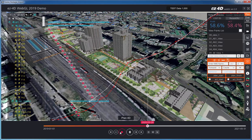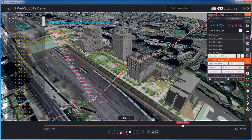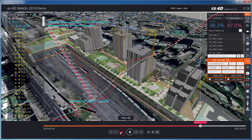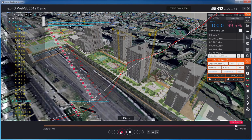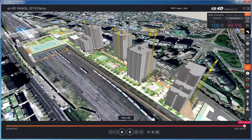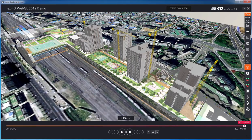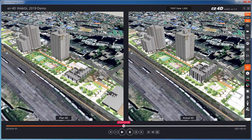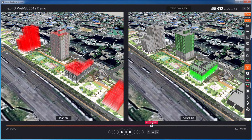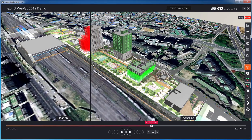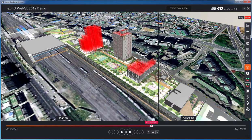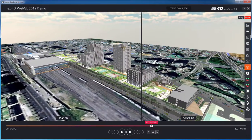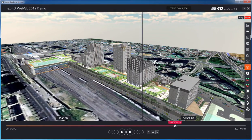Users can check progressing activity in 3D by overlapping the progress status with activity bar S-curve in 3D. Also, 4D progress of plan to actual in both screens can be executed and managed at the same time. If actual progress is later than planned, it is displayed in red. If actual progress is faster than planned, it is displayed in green. This makes progress control clear and intuitive.